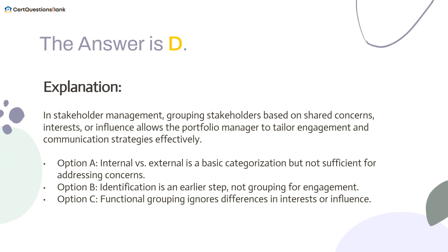The answer is D. In stakeholder management, grouping stakeholders based on shared concerns, interests, or influence allows the portfolio manager to tailor engagement and communication strategies effectively.